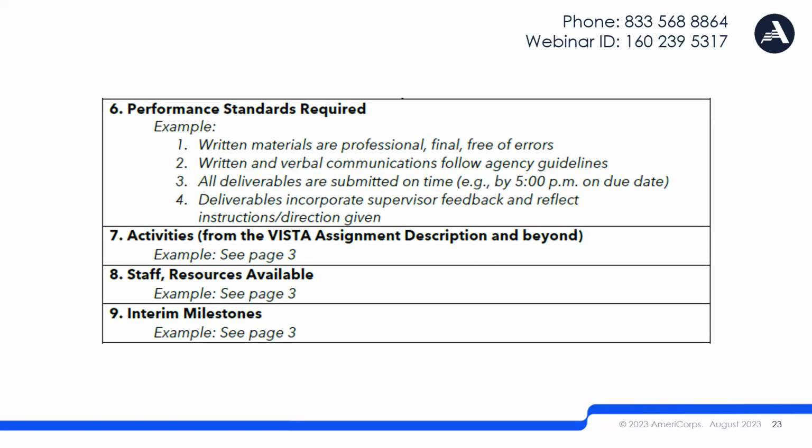interim milestones. Let's pause here to review what we mean by interim milestones. First, the final milestones for Evan will derive from his VAD activities, and those will be accomplished through smaller interim milestones. Interim milestones are opportunities for Evan to document short-term timeframes and achievable tasks that will ultimately lead up to final timeframes and tasks.